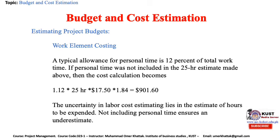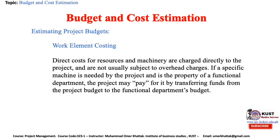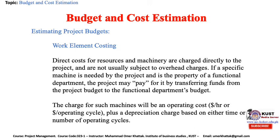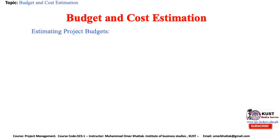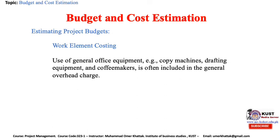Direct costs for resources and machinery are charged directly to the project and are not usually subject to overhead charges. If a specific machine needed by the project is the property of a functional department, the project may pay for it by transferring funds from the project budget to the functional department's budget. The charge for such machines will be an operating cost plus a depreciation charge based on either time or number of operating cycles. Use of general office equipment such as drafting equipment and copying machines is often included in the general overhead charge.